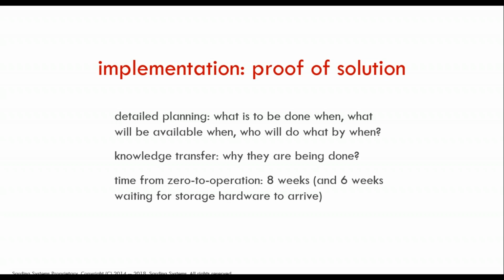Along the way, we have knowledge transfer to the client so that the client understands why those actions are being done. And the time from zero to operation was just 8 weeks, and 6 weeks of which was waiting for storage hardware to arrive.